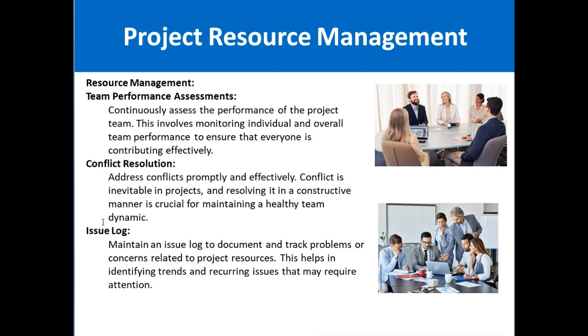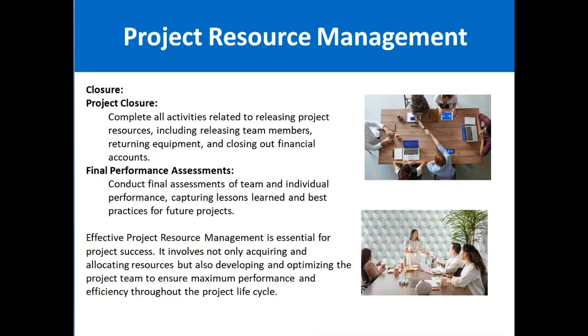Then an issue log should be maintained. An issue log means properly documenting and tracking problems or concerns related to project resources. This helps in identifying trends and recurring issues that may require attention as well. Normally we can use Excel sheets in which we mention the issues, but it is not just a register in which we list the issues. We should properly document and track what the issues were and when they have to be resolved.